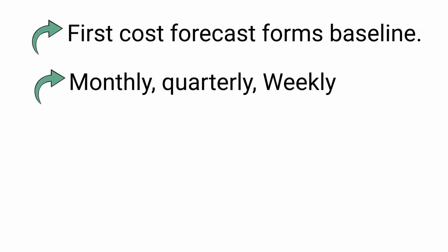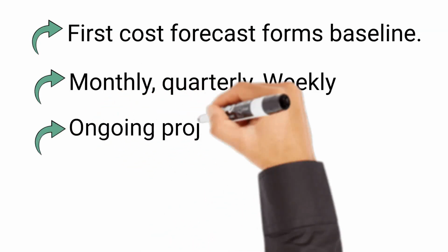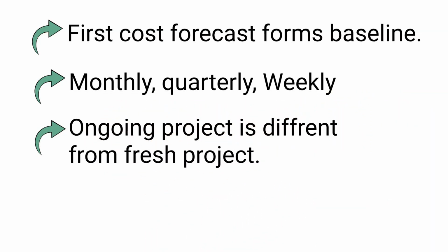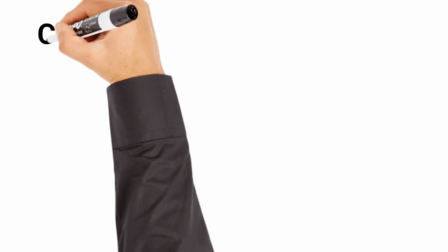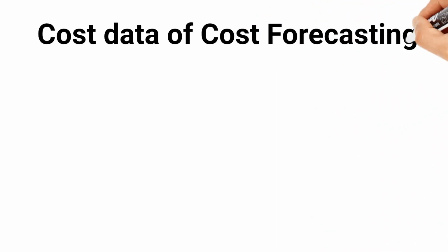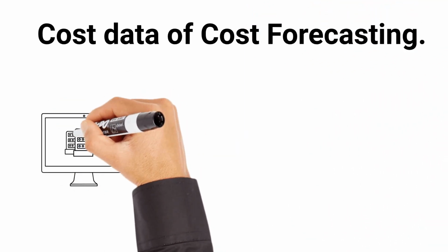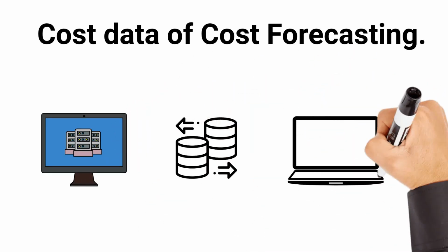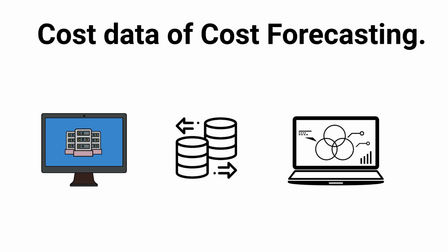Sometimes, companies do prefer cost forecasting at certain key milestones of the project for financial reasons. The challenges in cost forecasting for an ongoing project would be different than for a project which is at the initiation stage or still in the tendering phase. A common mistake I found people usually make in their cost forecasting process is the cost data utilized for cost forecasting. Note that an adequate amount of data is necessary during project forecasting. Ideally, you begin forecasting when the project is at least 20% complete.